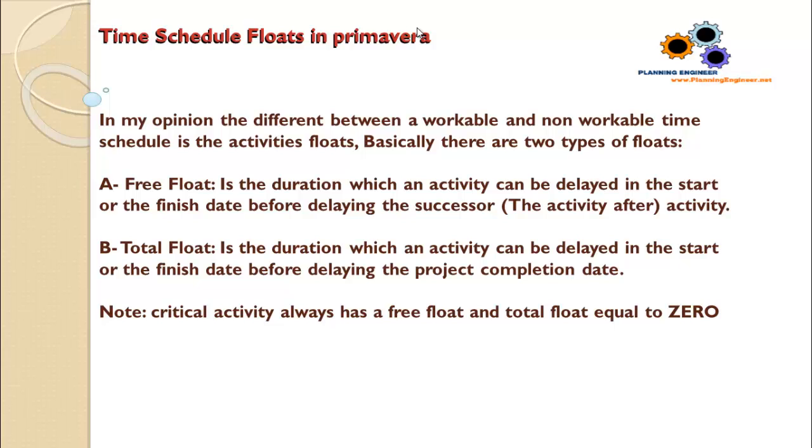Free float is the duration which an activity can be delayed in the start or the finish date before delaying the successor activity. The successor activity means the activity after. Simply, the free float is the amount of time which an activity can be delayed without affecting the activity that will start after.